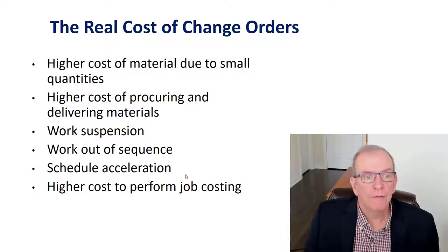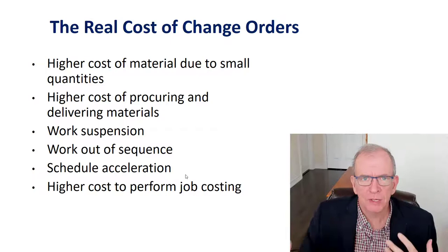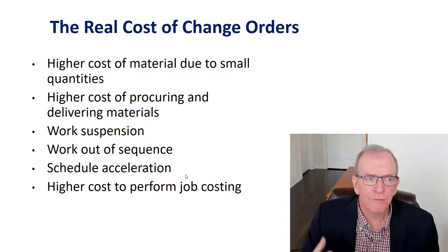You also have higher cost of materials because you're just picking things. You haven't had time to scale these things up. We talked about materials and deliveries. You're just trying to get these orders very quickly, very often because these changes need to be done more quickly. You didn't really have time to effectively plan them, and you may have had to do some of the work